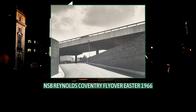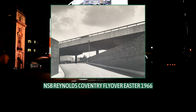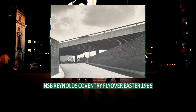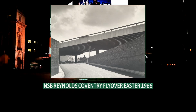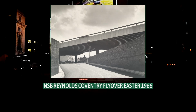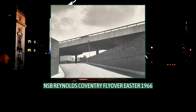The council had originally intended to make an advance order for the steel required for Stage 4 in 1962, following the successful and economical work done on Stage 3. But the government vetoed this plan, and by 1964, when the Hill Cross materials were ordered, the steel market had recovered and costs were significantly higher. Compulsory purchase orders were made in 1963 and were approved by the ministry.